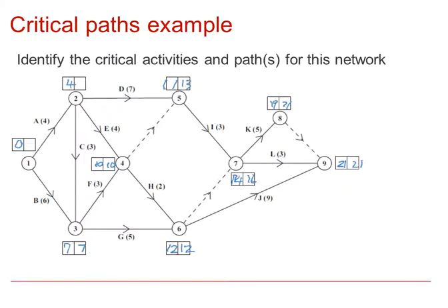We have a 4 in that, because 13 take away 7 would give us a 6, but we have had a 7 take away 3 to get back, so that's the smallest number, so that's a 4, and then as expected a 0 there.